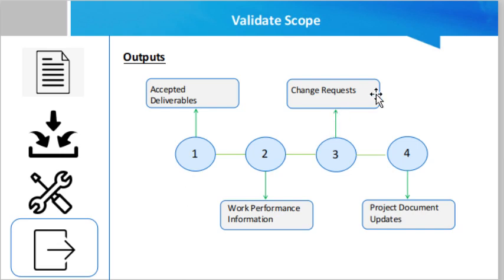Regarding change requests: it is assumed that all final deliverables would be entirely accepted by the stakeholders. Unaccepted deliverables are documented along with the reason for non-approval. In such cases, the deliverables will require changes, and that is when the change request process comes into effect to repair the defect. After the change request is executed, they are reviewed through the Perform Integrated Change Control process.